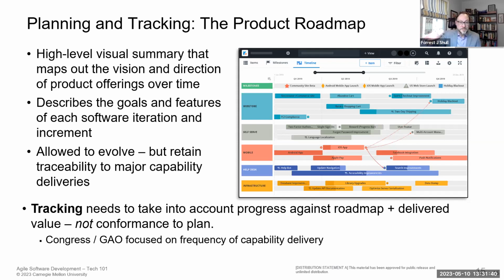The different colors, so the different rows here, means that there's multiple lines of effort, right? And so typically what we see from programs is I'll have a different color for each major set of capabilities that I'm working on, because I'm typically doing a couple different things at once. And one of these might also be I'm building out our infrastructure at the same time. So I have a line that says, look, I have some infrastructure things I have to take care of at the same time. And what this gives us, again, is a way that I can articulate the goals.